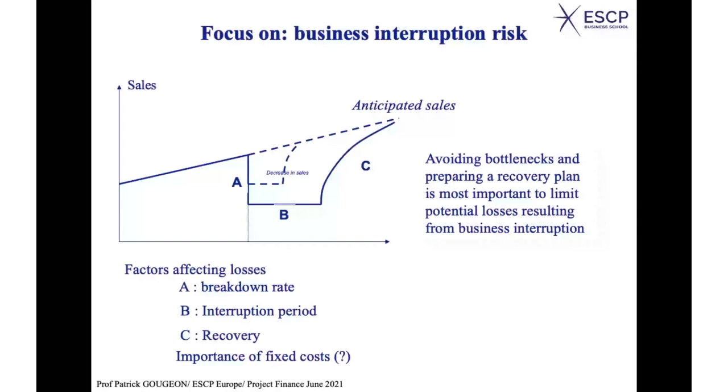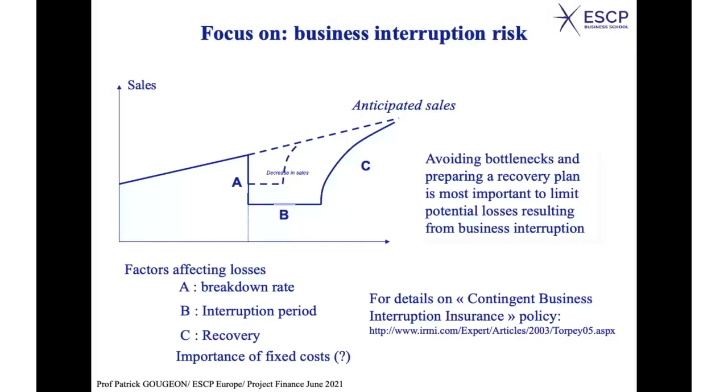Usually, for instance, if you ship a new equipment to recover fast, if it takes, for instance, 3 weeks for the transport period, maybe rather than doing it by sea, you can do it by air. It will be more expensive, but the extra expense will be worth spending because you may reduce by 3 or 4 weeks the delay to get your new equipment. And this can be covered by the insurer because the insurer will also gain by reducing the period of indemnification. So what are the main causes of business interruption?